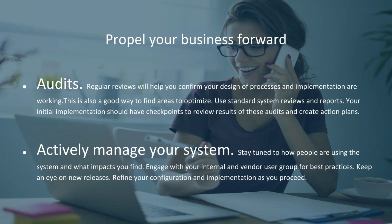One of the things that many of the customers and prospects we talk to talk about is the importance of having external audits. So this is either external consultants or external people who have not been an active part of the project within your organization, to come in on a regular basis, at least quarterly, oftentimes a shorter meeting on a monthly basis, to provide that external view, to ask the hard questions. What I like to talk about when I show up is I'm optimally ignorant, so I'm going to be asking questions and go into my Columbo routine, if you will.